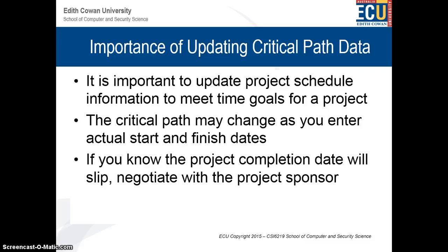Importance of updating critical path data. It's important to update project schedule information to meet time goals for a project. Why? For example, if you make a delay, then you should update the schedule and see if you can still meet the goals. The critical path may change as you enter the actual start and finish dates.